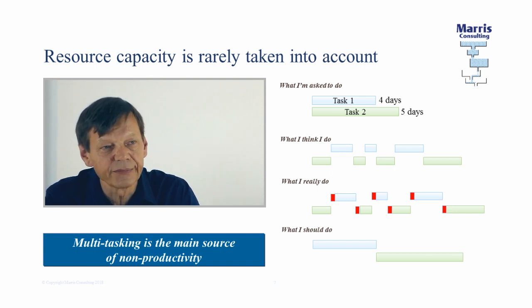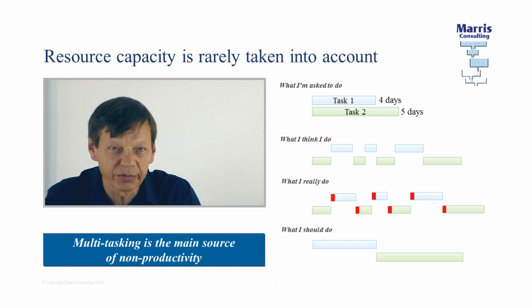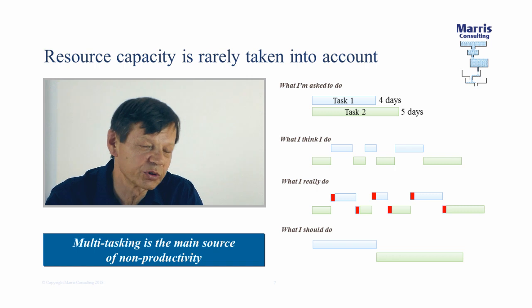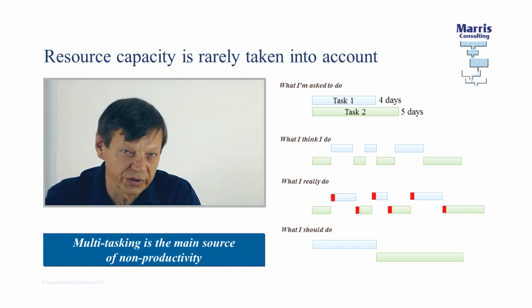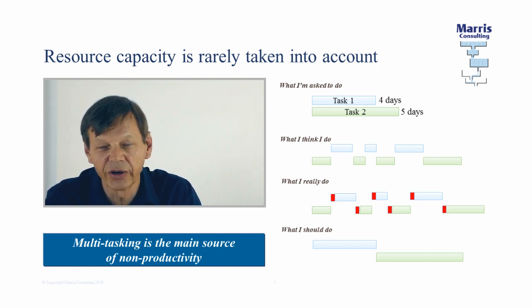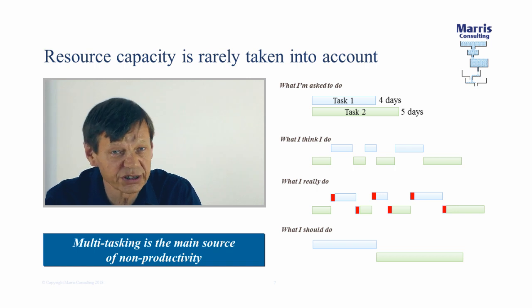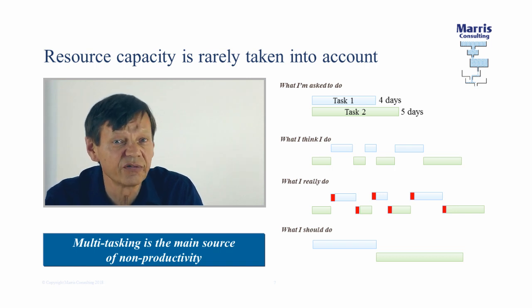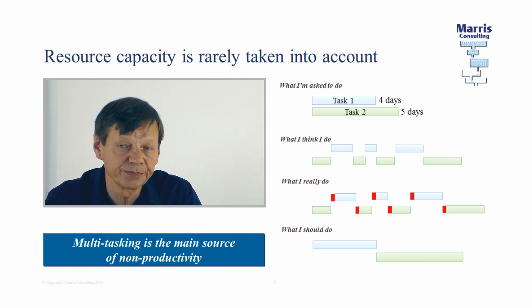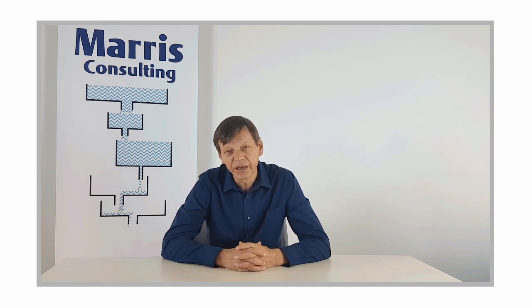Okay, well, that sounds like a reasonable compromise, but what in fact happens is that their multitasking, their switching between tasks, is a lot more frequent than that. We do a lot of audits of this sort of situation, and quite regularly we find people who are multitasking to the point of switching 30, 40, 50, 60 times a day between projects, right? So they're spending 5, 10, 15 minutes at a time on a given project before switching to something else, and that's a real killer.